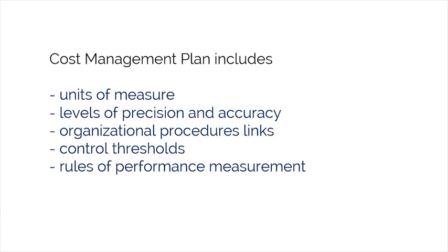It's really a strategy document that will include, but is not limited to, units of measure, levels of precision and accuracy, organizational procedures, control thresholds, and rules for performance measurement. It will also outline the format and frequency for the various cost reports that will be made available to various stakeholders.